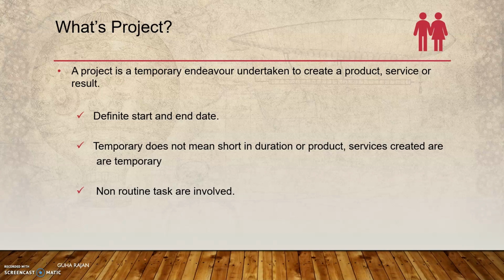And similarly, if it is a house construction or a building construction, when the foundation, concrete, flooring and walls are being done, interior work, electrical panel fixing and electrical wiring will never happen.